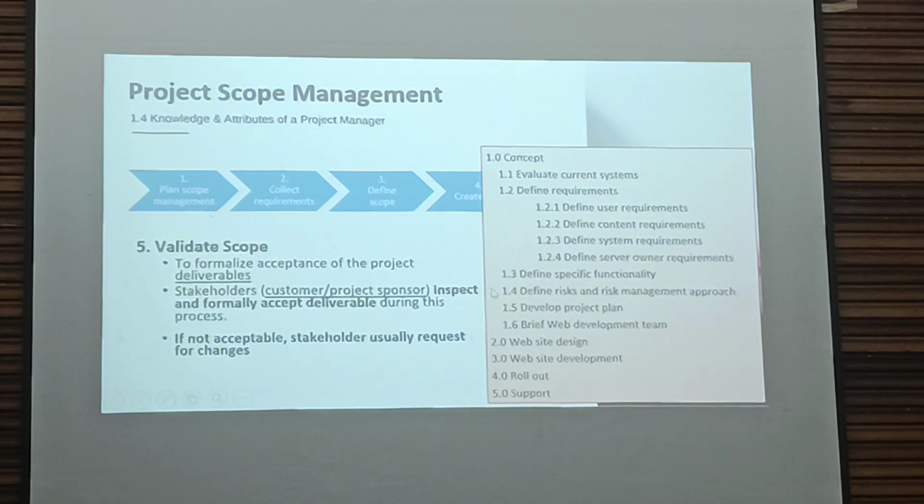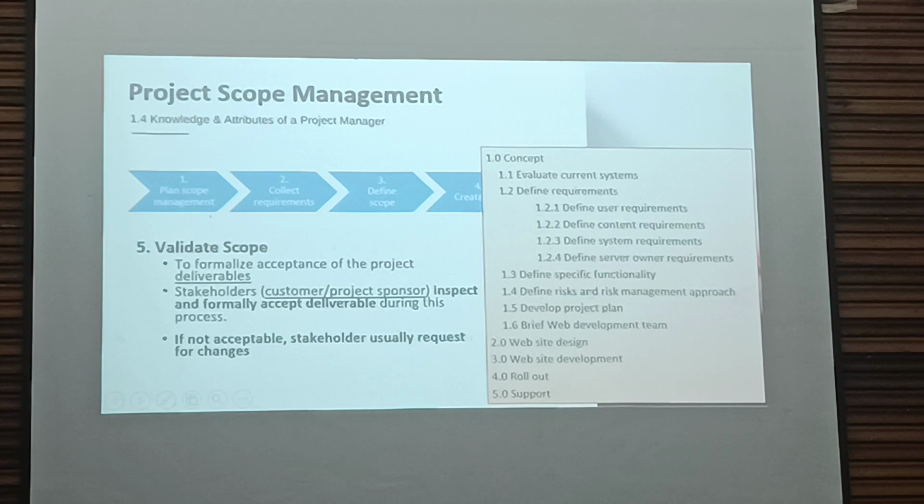So let the customer or project sponsor inspect the project scope and approve the scope. If it is not acceptable, obtain a formal change request.